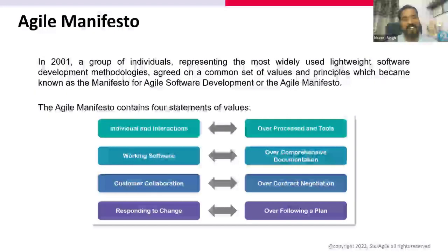So in that context, responding to change means saying, okay, let me just reprioritize it, right? I had a plan that I'm going to pick up these 20 items for my next sprint, but if you want something else to be prioritized, it's all your product. We will just pick up what you want to see next. So we allow them to go ahead and make the changes and reprioritize their work items, and we pick up according to whatever they decide.